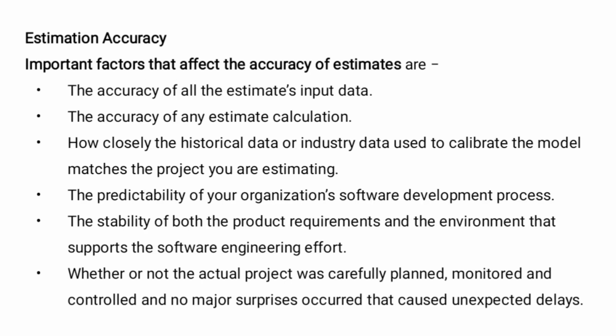Estimation accuracy. Important factors that affect the accuracy of estimates: the accuracy of all the estimate input data, the accuracy of any estimate calculation, how closely the historical data or individual data used to calibrate the model matches the project you are estimating, the predictability of your organization's software development process, the stability of both the product requirement and the environment that supports the software engineering effort, and whether or not the project plan was carefully planned, monitored, and controlled, with no major surprises that cause unexpected delay.